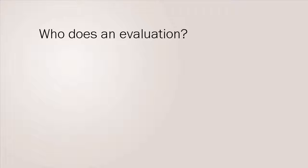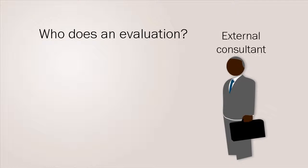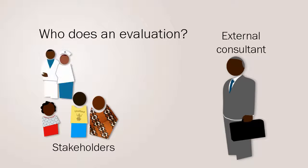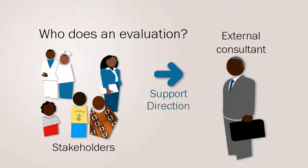Who does an evaluation? Evaluation is an activity that must be unbiased, so it is best to recruit an external consultant or a team to carry it out. Stakeholders, that includes the community, eye care professionals and funders, may also be involved as support and source of direction or information for the evaluation.